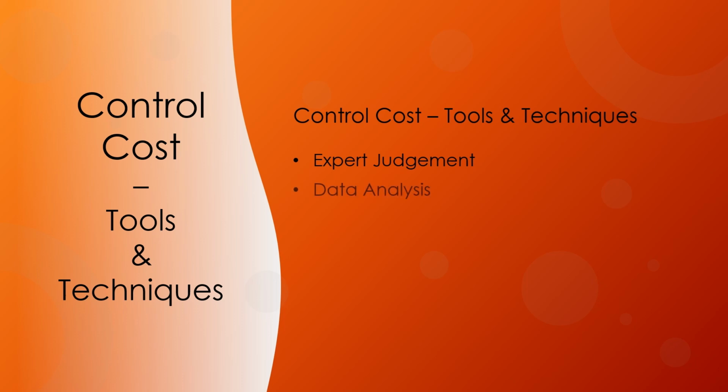The data analysis technique that can be used to control costs includes earned value analysis, or simply EVA. EVA compares the performance measurement baseline to the actual schedule and cost performance. EVM integrates the scope baseline with the cost baseline and schedule baseline to form the performance measurement baseline.